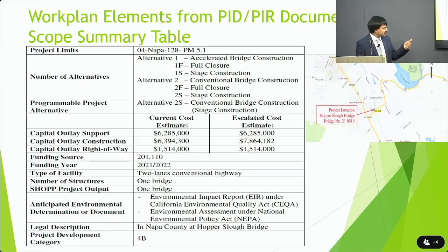another important element in this one is the environmental documents. As we all know, we have 2 different agencies, NEPA and CEQA. One is national, one is California. So they do have different environmental requirements for every project we do. So who makes the determination? Typically, the environmental generalist. He makes the determination what kind of environmental document you have to produce during the project progression. So if your project is a simple grind and pay project, it doesn't encroach into undisturbed soil areas, then those predominantly fall into a categorical exemption for NEPA as well as for CEQA. So those are straightforward projects.